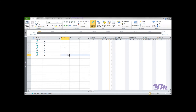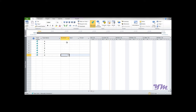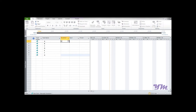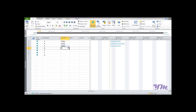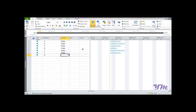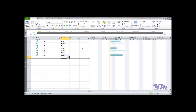In the adjacent column it says 'Duration,' which is the total span of working time for a task. Task A lasts about four days, Task B about six days, Task C about four days, and Task D about five days. Once the entries are done, you can see the bars appear in a light blue shade on this part of the screen.